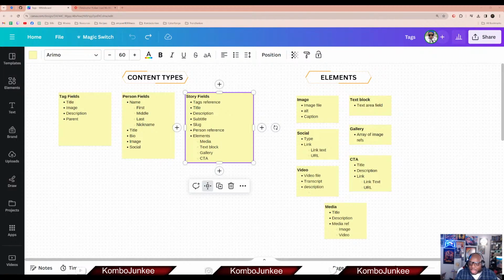So in our Rubik's Cube example, if you only have 2 developers and one of them is working on something different, you may plan for one of those developers, the one that's freed up with time, to focus on the top layer ticket while the other developer works on another priority. Okay, so in that sprint, you plan for this one ticket to get done.